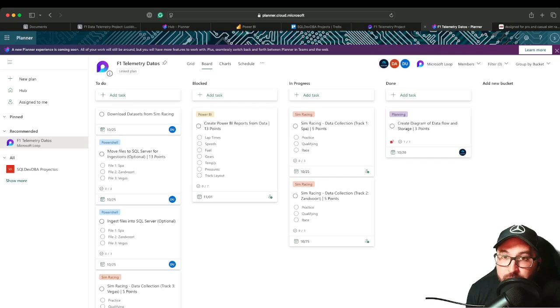It's because I use the first 2 sprints or so, which usually last anywhere from a week, sometimes a day or two, to maybe 2 weeks, usually never longer than 2 weeks, as a guide for myself. I'll take a mental note or even a physical note, or like a BI note, of how many tasks or how many points each member of the team was able to complete reasonably.